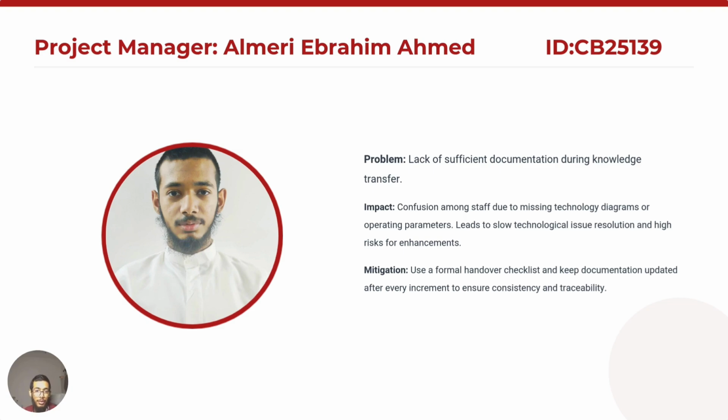For question 5, from the project manager perspective, a major handover issue in Bus Asia is weak documentation and poor knowledge sharing. If the system is handed over without updated diagrams and clear instructions, the team that will maintain it may not understand how it works. This can cause confusion, slow problem fixing, and high risk when we want to add new features later. To reduce this, we should update the documentation after every increment and keep it in one shared place, so everyone uses the latest version.